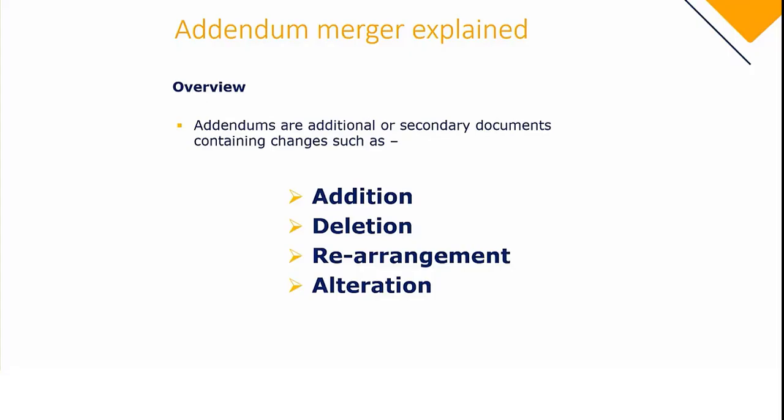Regardless of what these changes may be, they normally require more administering by those responsible, as this is something that usually takes place after a lot of effort had been directed at measuring and pricing sections of a bill of quantities. By the time we receive these changes, you'll find that we have spent a lot of time linking bill items to subcontract packages or linking them to a long list of activities in a construction program. And to start from scratch and recreate such links can be a very dispiriting task. And above all that, it can be very time consuming.